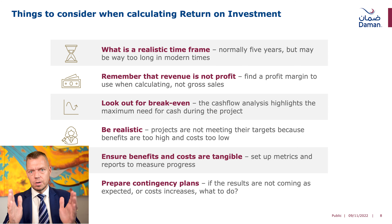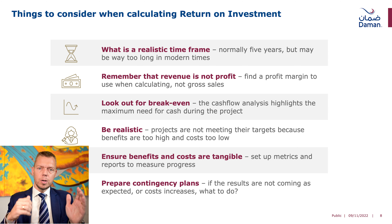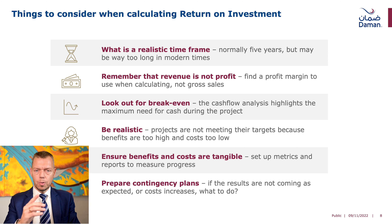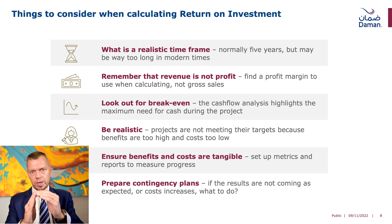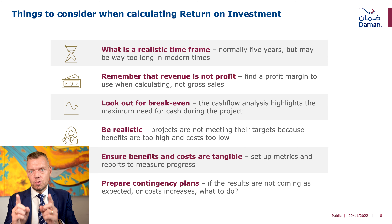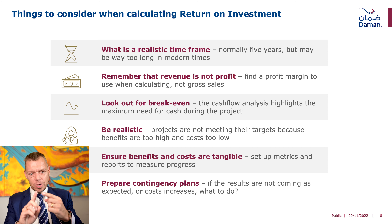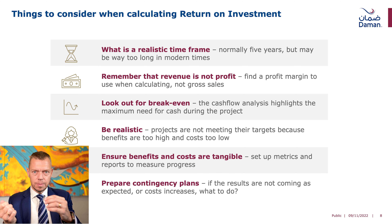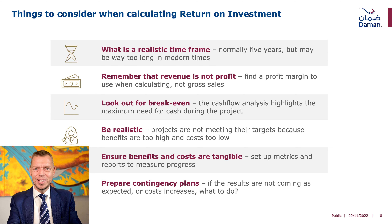Another concept is return on investment versus breakeven. ROI is how long it takes to get all your invested money back. Breakeven is when the money you're spending on the project becomes less than the benefits it's generating. This is important for controlling cash flow. When you calculate breakeven, the money you have out of pocket before that point is the maximum you need to ask your CFO for. The second you are breakeven, you are making more money than you are spending, and that starts paying off your initial investment.